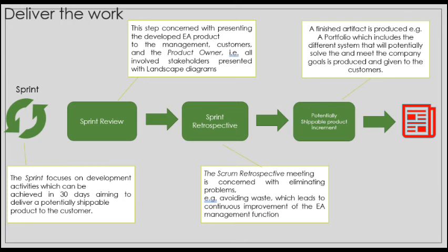Now we move to planning the work. You will do three things. You will review the product backlog, and then the backlog tasks that are chosen will be expanded by the team, and lastly, the artifacts that will be produced for that sprint will be chosen. And then lastly, you go into the exciting part, the sprint.